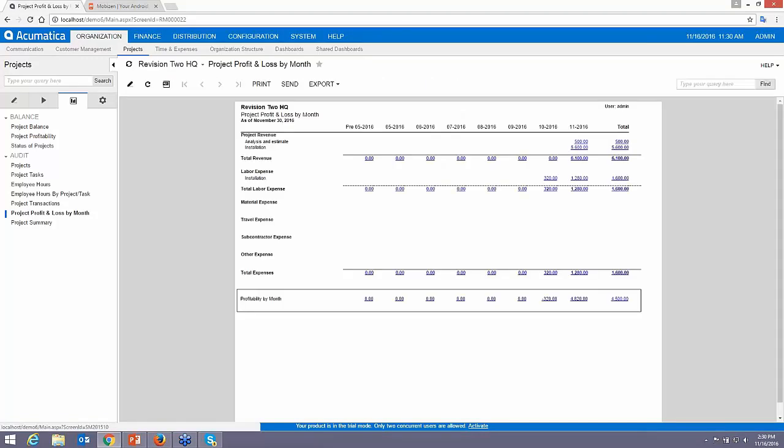We can get a detailed look at how we're doing by month. This is important so that you can track for those long-term projects. You can see how things are adding up month by month to see what's been allocated and what's been billed on a monthly basis, and see if, even though you're still okay according to your main budget, you might be way over budget for all the months prior to that, and the only reason you're still not over your project budget is because you have 3 months left in the project. This is a type of report that will help you easily determine that.